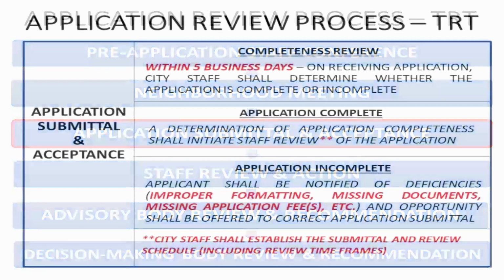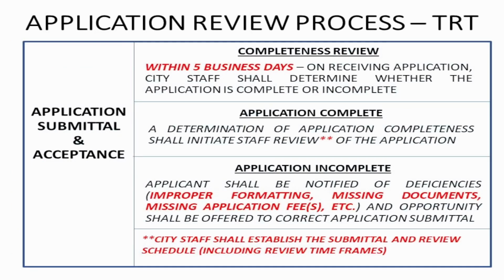So with regards to the application submittal, once we receive those applications, they are placed in a review cycle. We have a review cycle that begins every Thursday at noon, so applications submitted by that time get placed into a review cycle, and that initiates the staff review of the project.